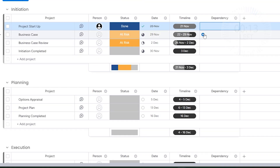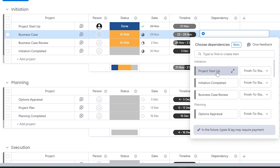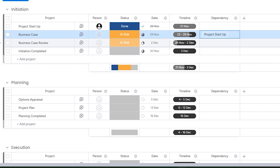Now we get to work on dependencies. For each task, click on the dependency field and hit the plus button. Choose the task that this task is dependent on, choose the type of relationship, and it's done. Notice that the more tasks you have in the plan, the trickier this part is — keep that in mind before you dive in, especially if you have a lot of tasks.